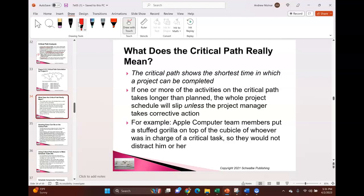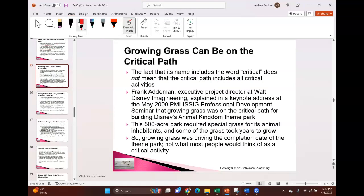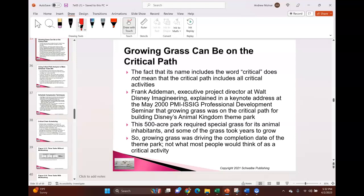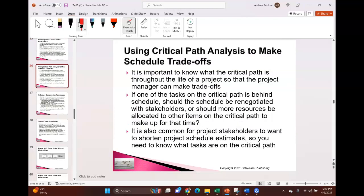The critical path shows the shortest time a project can be completed — it's important enough to repeat. If the critical path delays by a day, your whole project slips a day, so you want to monitor it closely. For instance, growing grass could be on the critical path — not because it's inherently important, but because it has no float. Other activities not on the critical path, like handling nuclear material, may be far more critical from a safety perspective, but that's separate from scheduling.